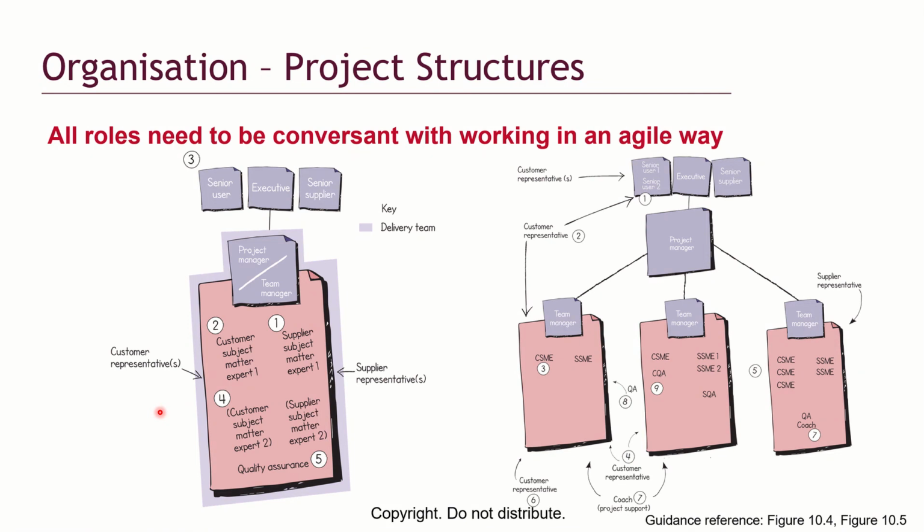If you have one team, then you need to have a project manager, and you can also delegate the job of a project manager to the team manager if you are using agile. Can you see this? Because in agile, project manager is not being used, then you can use team manager as well. Sometimes they don't call them team manager. In some projects, they call them lead, team lead, or lead engineer if it has to do with software development.